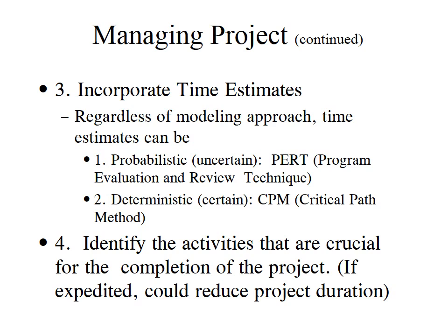But in the real world, it's more probabilistic, and they use 3 estimates. One is known as the most optimistic estimate. If everything works out fine, you will take 3 weeks to finish an activity. Then the most likely estimate, which is the likelihood that you will finish that activity in, say, 7 weeks. And the most pessimistic estimate is if Murphy's law is in action, everything goes wrong and you will take 12 weeks to complete the activity.